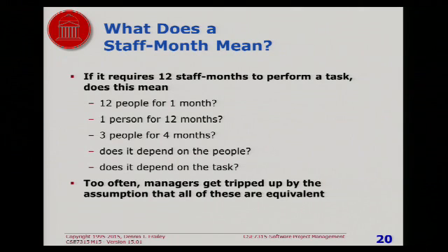And the reason I point this out is, I've seen people who do a calculation and they say, okay, I need 350 person months of effort to do this project. And the boss wants it done in 6 months. So they say, oh, okay, well, we'll just have 50 people and they'll work together for 6 months. Well, getting 60 people to work together for 6 months is not always easy to do. So the coordination may be, that might not be a realistic plan. Maybe 6 months is simply not enough time to get it done.